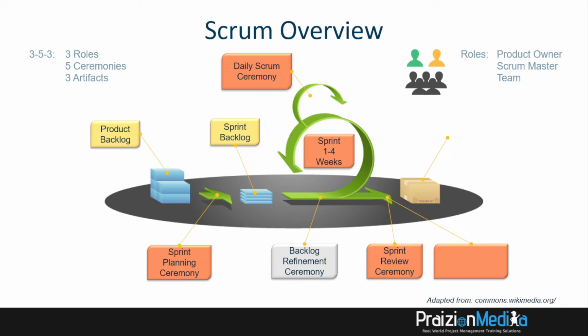Next, we have a sprint review. The sprint review comes after the increment has been an output from this entire time box. You cannot necessarily have a full review without having your increment. So the increment is desired. If you don't get to the full increment, whatever has been worked on so far could be demoed. We also refer to the review as a demo.